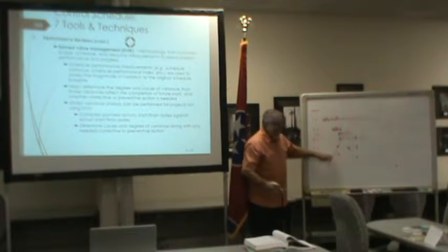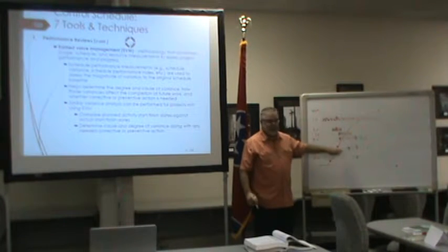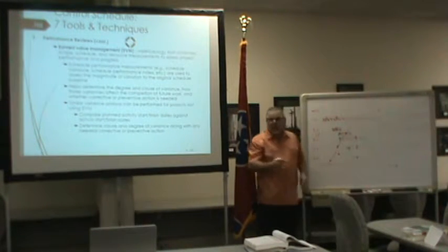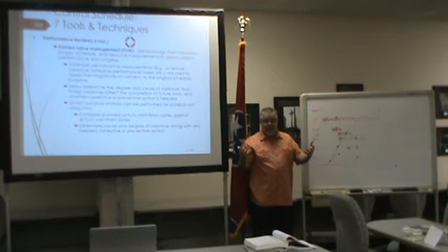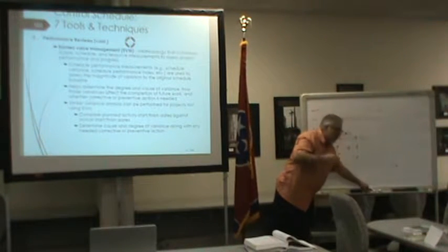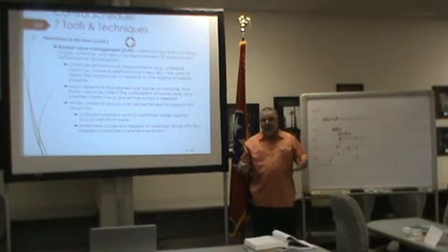Right? I'm going to add up the dollars in 1. 1 and 2 gets me this. 1 plus 2 plus 3 gets me this. Remember that? Everybody, you're comfortable with that conceptually. Is that true? That's the way I create the cumulative spend plan.